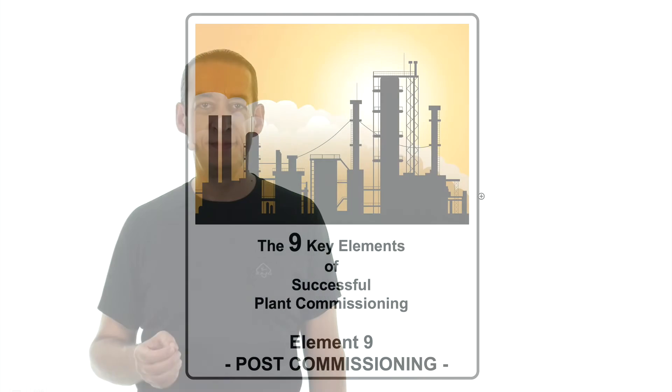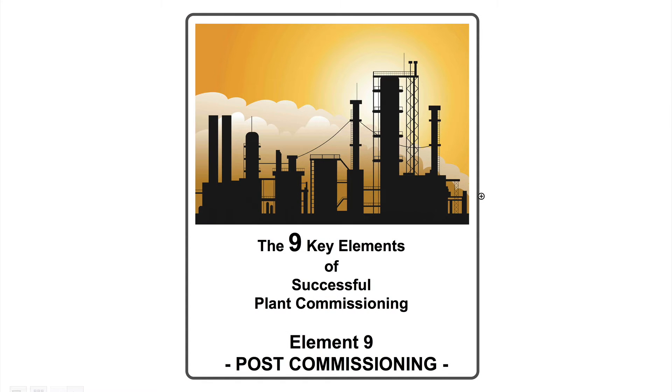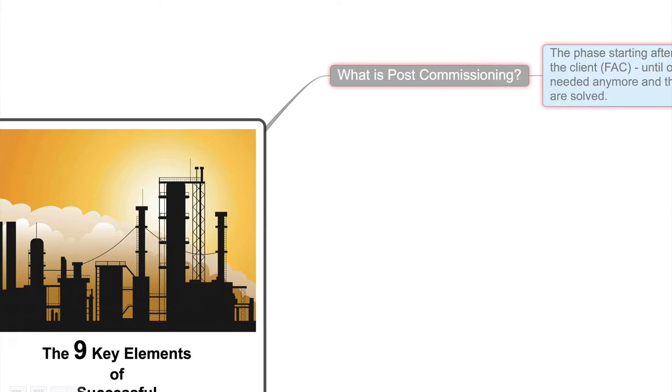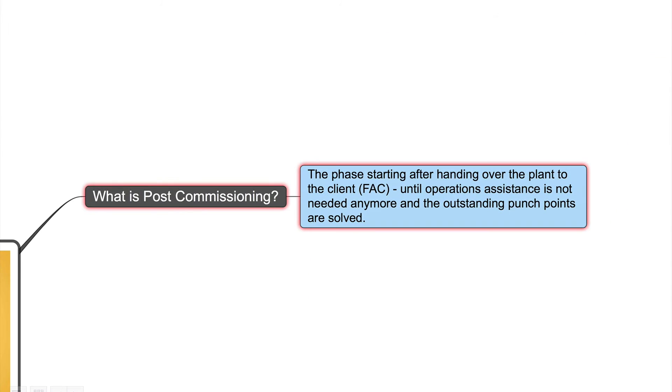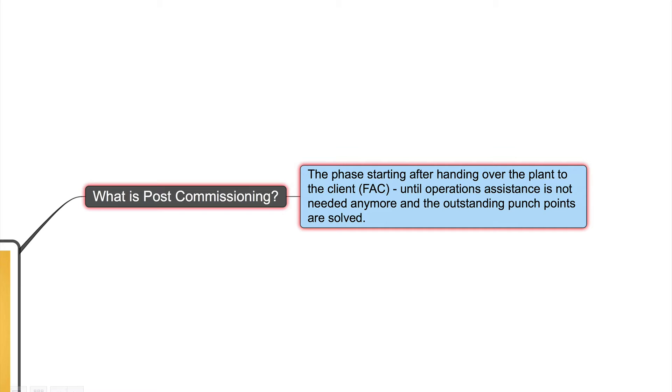Let's start with the explanation of post-commissioning, our last step of our 9 key elements for successful plant commissioning. Element 9, post-commissioning. What is post-commissioning? This is the phase starting after handing over the plant to the client, our final acceptance, FAC, until operations assistance is not needed anymore and the outstanding punch points are solved.